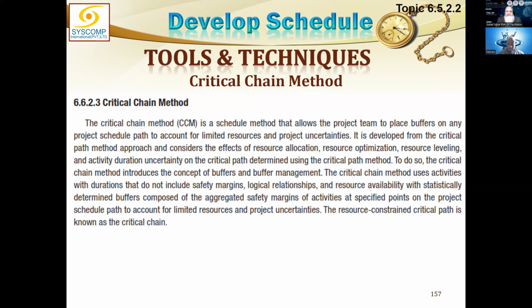Naturally, the project manager is not allocating the durations. Durations are being suggested by the lowest level people who are actually going to do it. That is the best way. You should not estimate on your own. You should involve and engage those people who are actually going to do it. Otherwise, if you tell them you have 10 days, they will say it can't be done in 10 days, and then you have to debate with them.